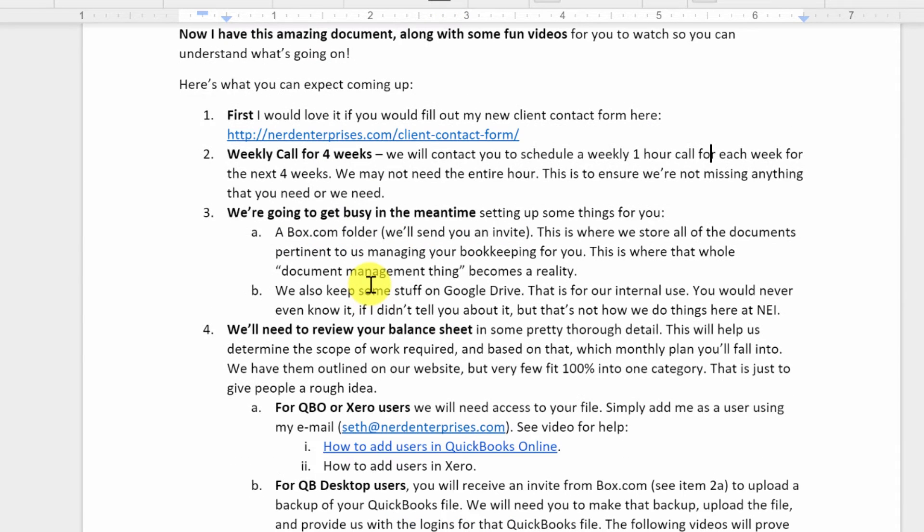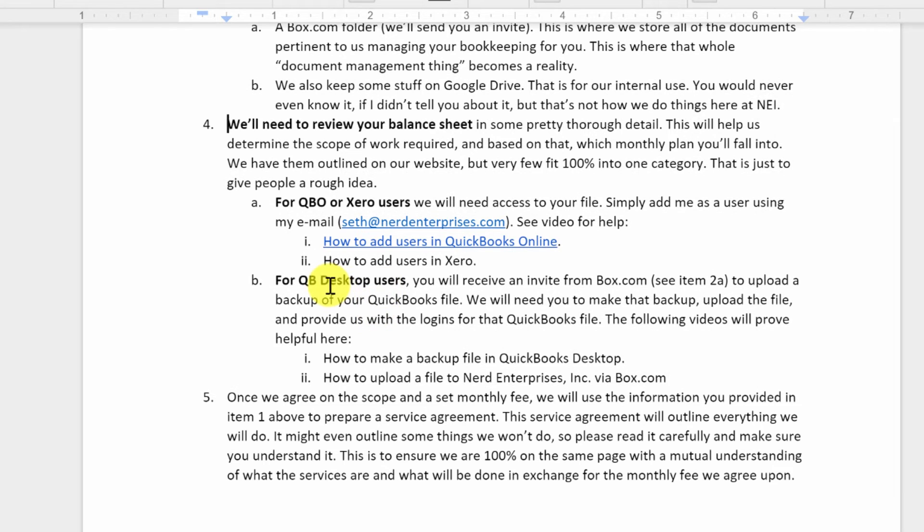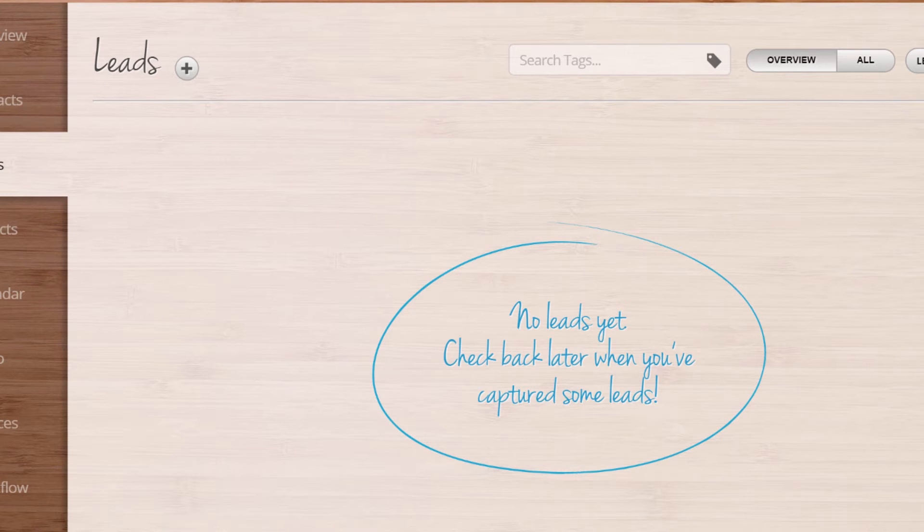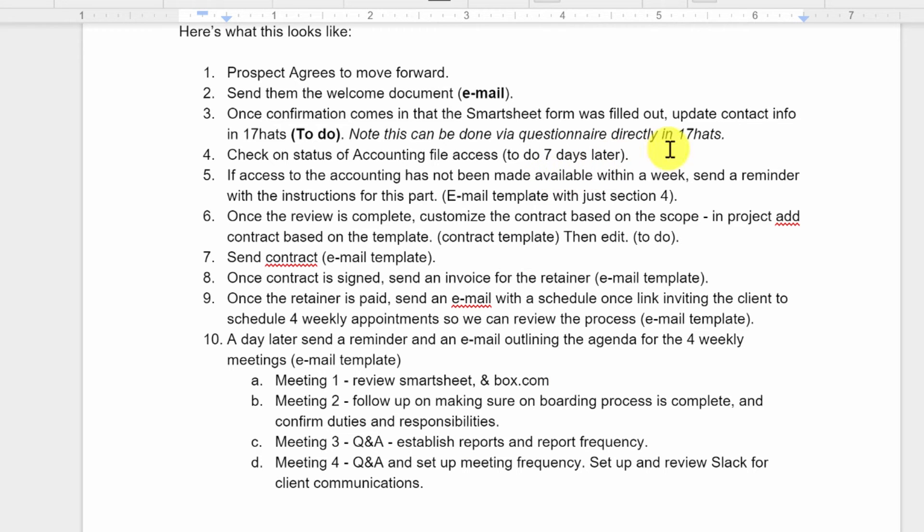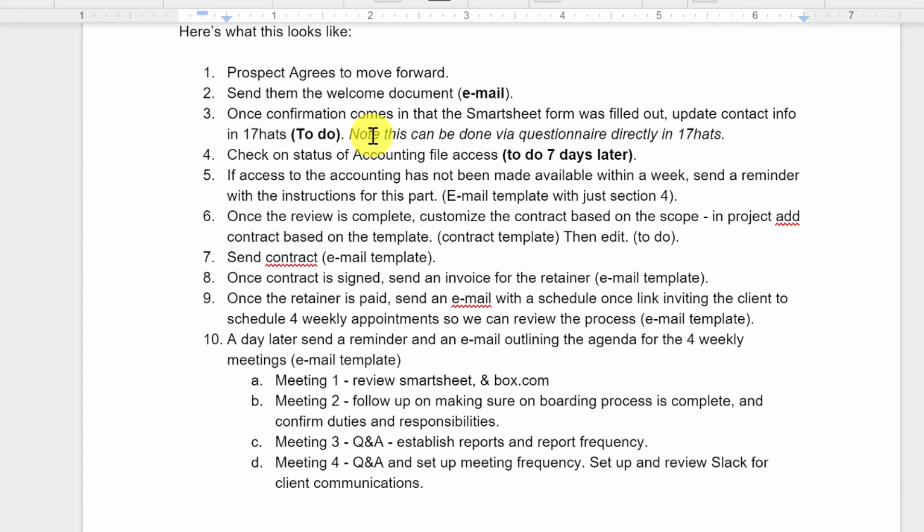Then we need to check on the status of the accounting file access. Now remember this original document, among other things, gives them instructions for how to add us as a user. Let's say in QuickBooks Online. And based on that, we'll need access. If they're a desktop user, as you can see, the instructions are here for how to make the backup and upload it via Box.com. So once those instructions are provided, we'll wait seven days. If we don't have it within seven days, then we want to send a reminder and say, hey, we can't move forward until we get this accounting file from you. We need to do our review. If they get it to us prior to the seven days, then that's why this is great as a to-do item. Because I can just now check it off and say, okay, it's complete. And then this one is a to-do also, which at that point I would also mark complete. And notice I have it established that it's a to-do seven days later. So seven days after this item is done. Seven days after, it's really going to be after the welcome document was sent out, because this is sort of inconsequential in terms of that.